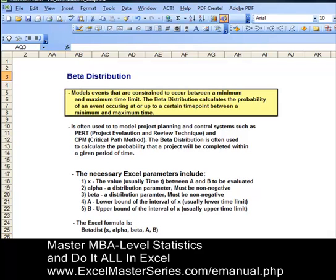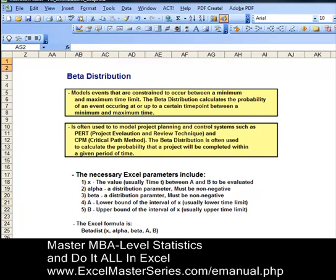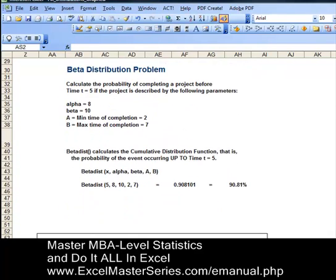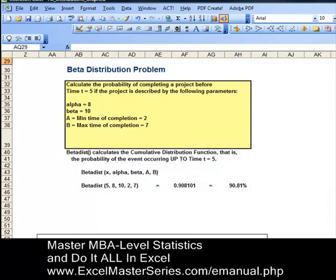The beta distribution models events that occur between a minimum and maximum time period. It calculates the probability of an event occurring up to or at a certain time period within this time interval, and it's used to model project planning control systems such as PERT and CPM. Let's take a look at a typical problem that uses the beta distribution and can be solved in Excel.